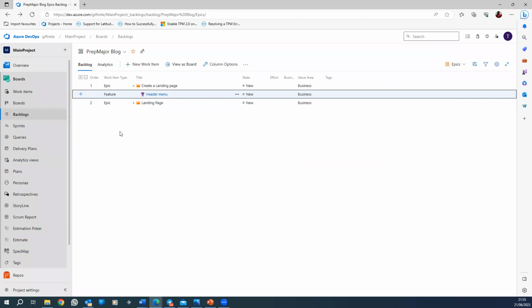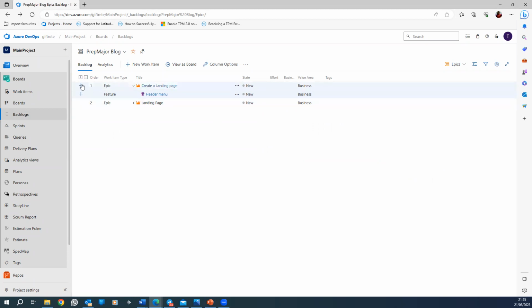All right. So if you want to create another feature, what would you do? Will you come to the epic or to the feature? No, you go to the epic, because that was how I created this feature. Remember the relationship. The epic gives birth to the feature, which gives birth to the what? The backlog items, right? So if we want another feature, we come here.